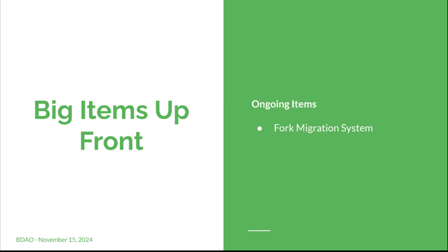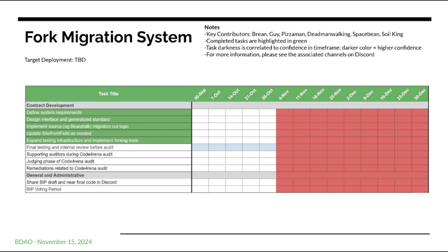Probably the biggest item — really the only major item on the agenda for today — is the fork migration system. You can see in the Gantt chart that the fork migration system has moved to TBD, essentially being put on hold for now. This is primarily due to how the price of Bean is affecting the ability to pay the contractors that would be performing it, or pay the group that would be facilitating the audit. I'll turn it over to Guy to add some more information.